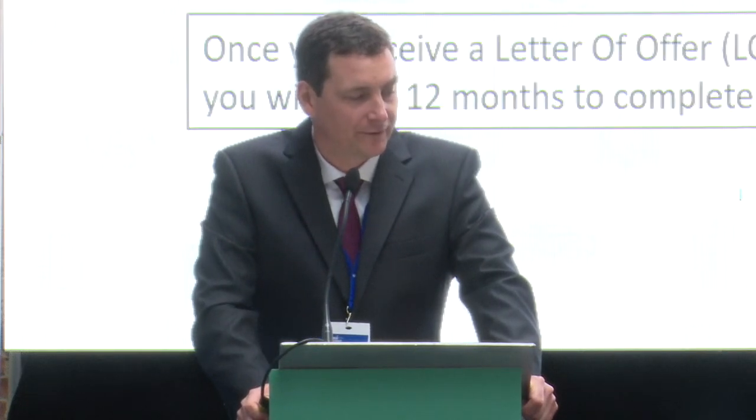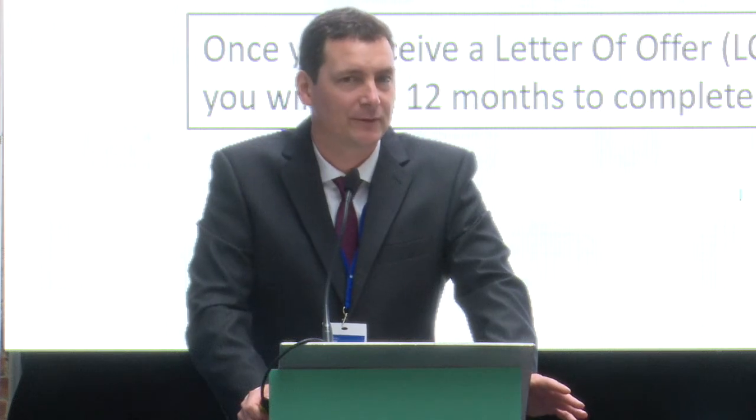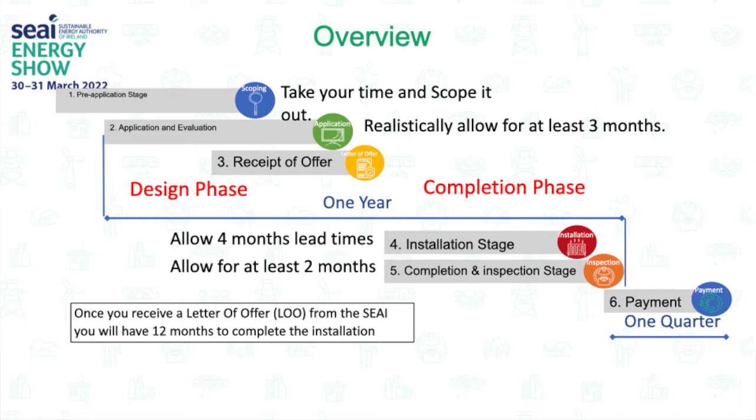Once you get your letter of offer, you have 12 months to complete your installation. Now, this might be a very small amount of time for a large installation. If you think it's going to take 18 months or 2 years, let us know. We'll put that on your LOO.